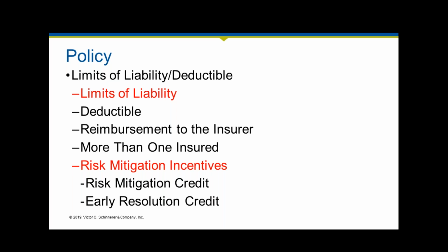And broadly, those mitigation strategies always start with the baseline that you have a written agreement in some form or fashion that pertains to the project for which the claim is arising from. And once you have that baseline, then we're looking for you to have several aspects of things that may range from managing your subconsulting relationships to make sure that they have the minimum required insurance required by the owner, that you've gone through a pre-project planning process with members, independent peer review or constructability review internally, and also maintaining a contemporaneous submittal log and following up on that too.